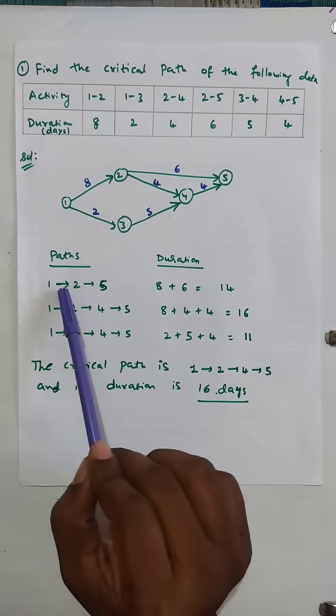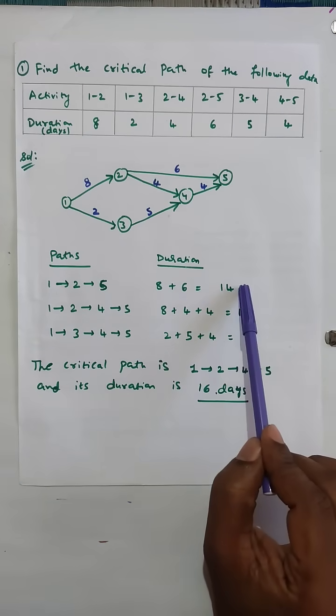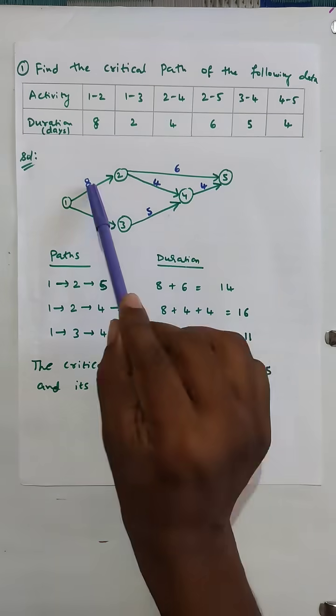First path 1-2-5: 8 plus 6, that is 14 days duration. The second path 1-2-4-5: 8 plus 4 plus 4...